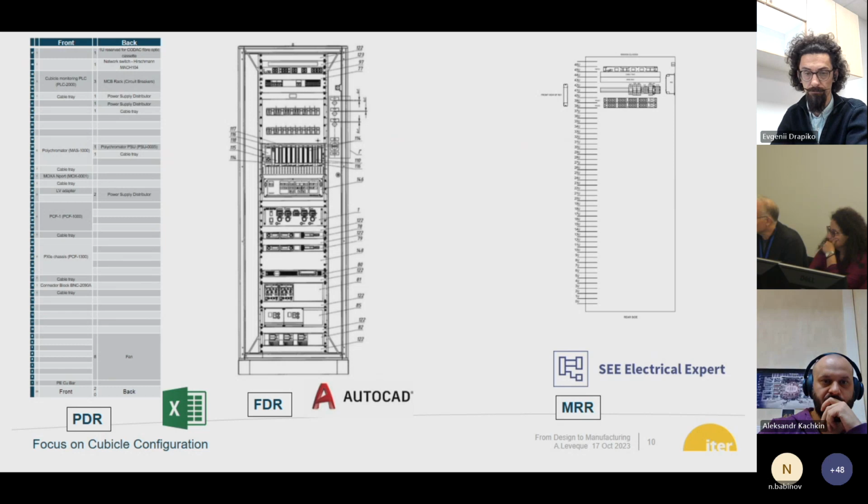You cannot just expect to have the power coming out of nowhere. It should be identified, a connection from the BP to your device, and it's not even in your diagram. It should be in the NX0 diagram that they have identified. So maybe that's what's blocking, that they need to update their diagram to include it. The problem also is that the BPs are not only designed and manufactured, they are installed on site. But we haven't gone to PDR yet, so we need...